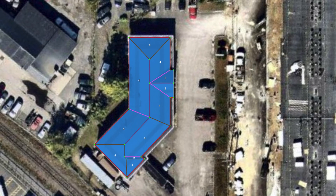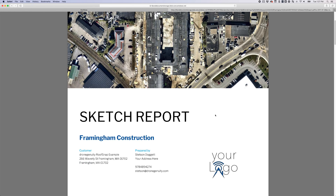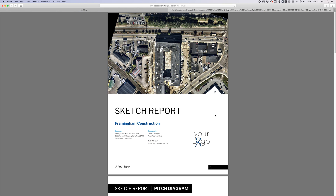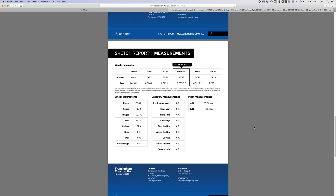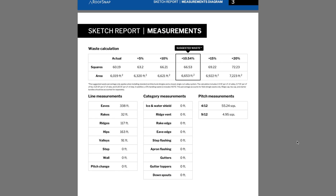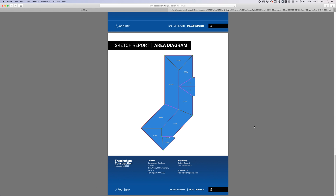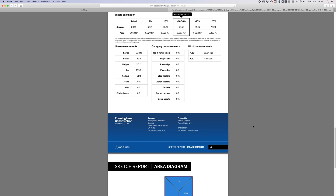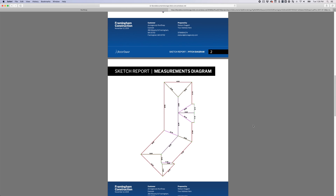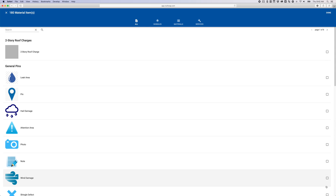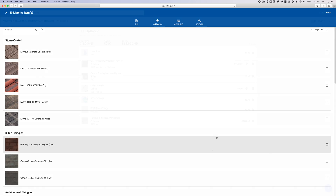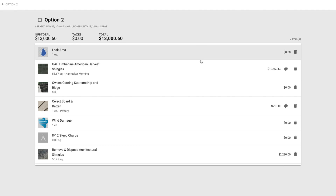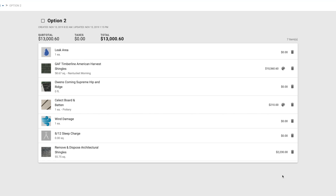Whether you do it yourself or pay a technician, RoofSnap comes to life when you have your sketch complete. It allows you to generate a detailed report which contains an overview of your project, a pitch diagram, a measurements diagram, total line, category, and pitch measurements along with an area and waste calculation for a reshingling project, and finally an area diagram. When your sketch is complete, you can use the estimate section to add materials and services to the project. RoofSnap will use the area calculations from your sketch to help you quickly and easily generate quotes.